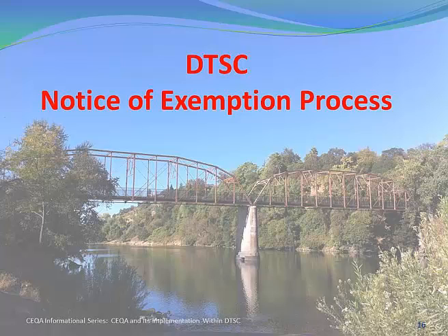If there was a negative dec or an EIR previously prepared, we will not be preparing NOEs. We will be deciding whether we need to prepare anything, or whether we need to prepare a supplement to that old EIR or negative dec, a subsequent or an addendum, or perhaps a memo to the file. But we will not be preparing an NOE if there was a negative dec or an EIR prepared previously.